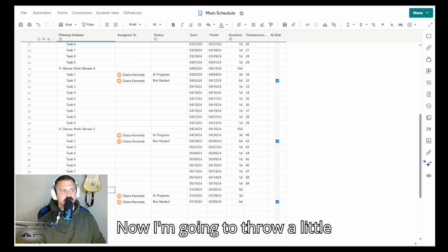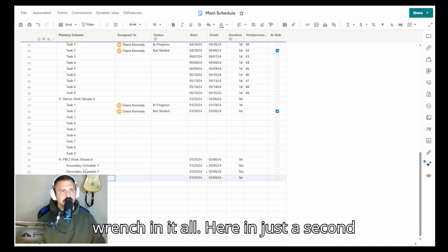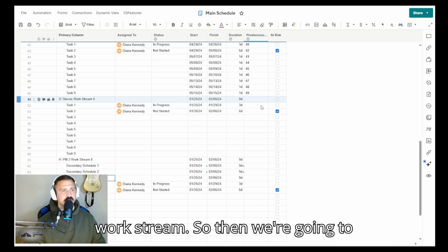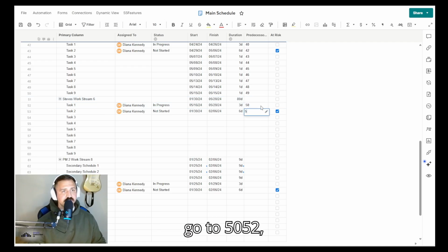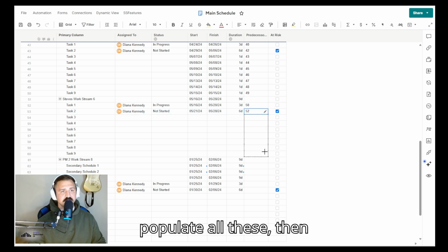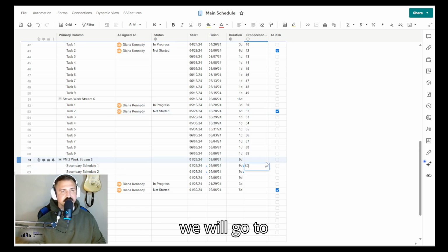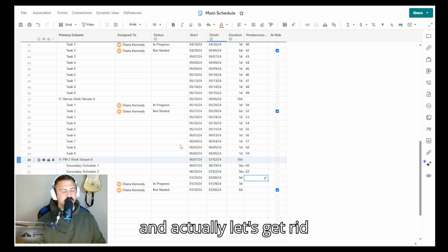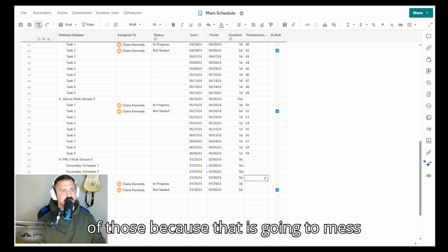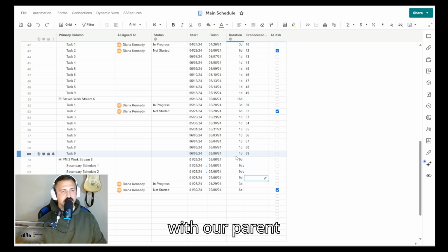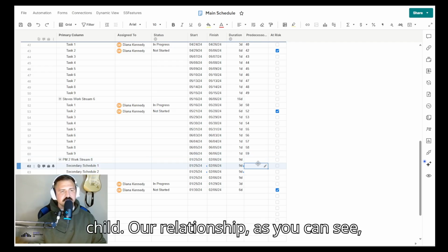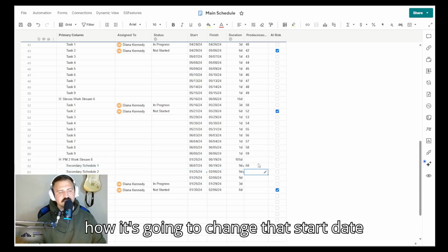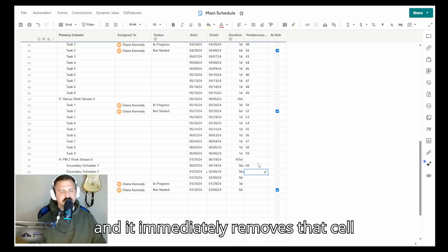Now, I'm going to throw a little wrench in it all here in just a second, and we will include PM's work stream. So then we're going to go to 50, 52, populate all of these. Then we will go to 60, 62, and actually, let's get rid of those because that is going to mess with our parent-child relationship. As you can see, let's show you kind of what would happen if I were to click 60. See how it's going to change that start date and it immediately removes that cell linking?